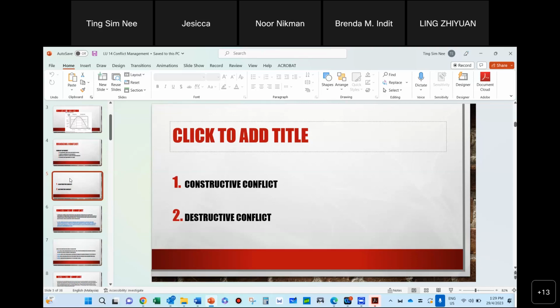If you read any contract, you will see a clause that goes something like: refer all conflicts or all disputes to the SO to be resolved as early as possible, or to be resolved first before you move into alternative dispute resolution techniques, which involve external people like arbitrators, mediators, conciliators, adjudicators, even a judge if you go to court with your dispute. So this is the difference. This is the first layer.